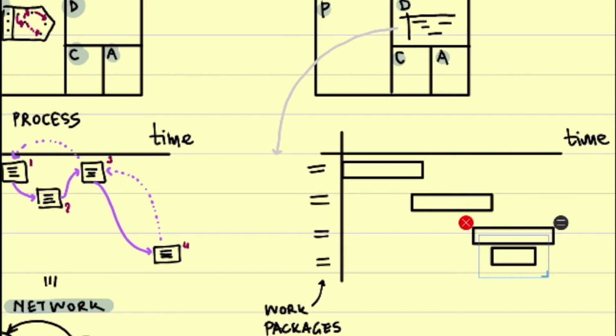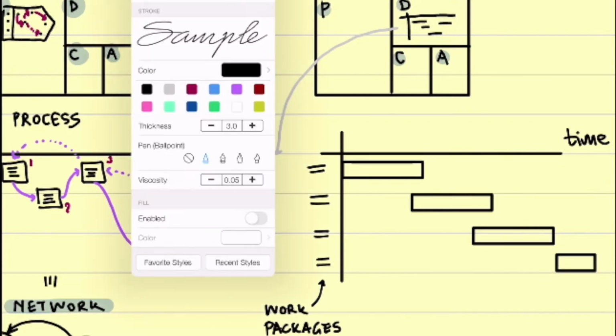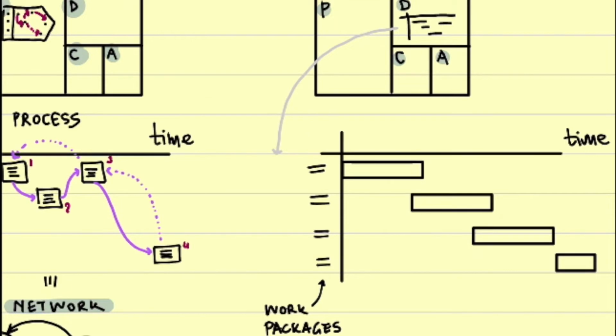And here we can also set certain dependencies. So whenever I am done 90% with my first activity, I can go and start with the second, and the second activity needs to be 70%, and the third activity can be 100% done, and only then can I start with the fourth one.